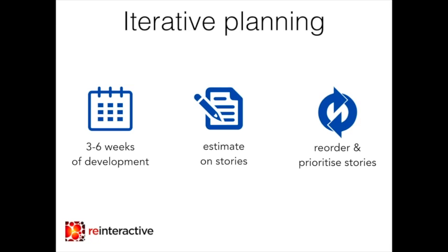There's also just a question here from James. He said, what's the idea behind Scrum and 2-week sprint compared to 3 to 6 weeks development? Really, in terms of your sprint and how long you're going to have it, James, it's really regarding your mix of resources and how much contact you have with the client and that sort of thing. What we tend to do is we'll have weekly sprint meetings where we go over what we're going to get done in the following week, because usually we're developing at such a high pace and the client is so engaged that we can get real work done every week.